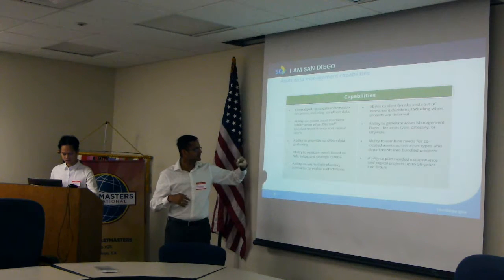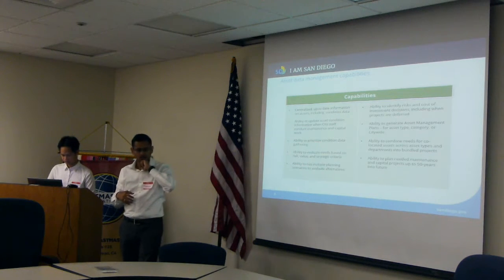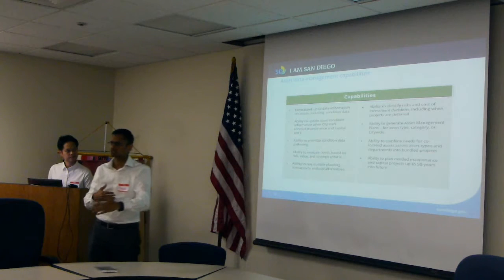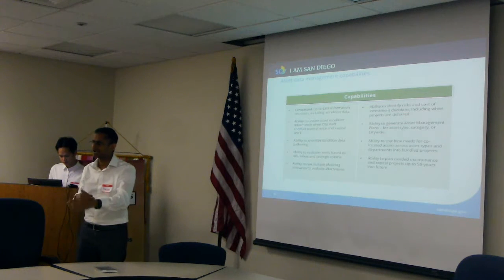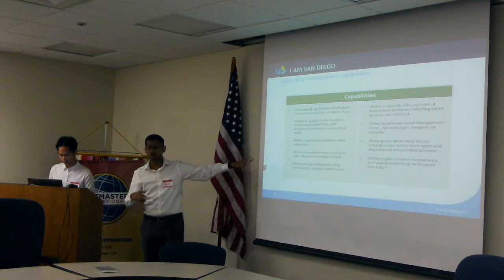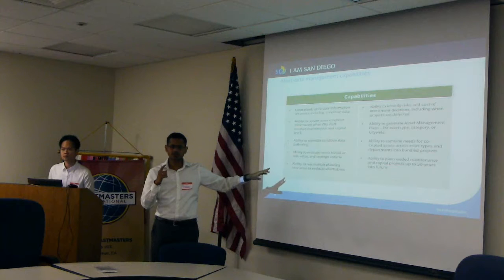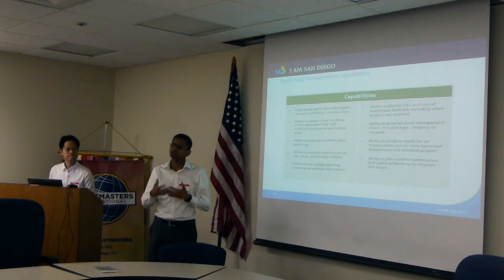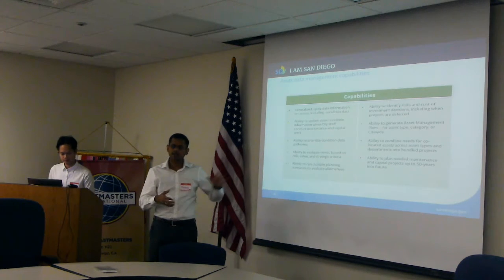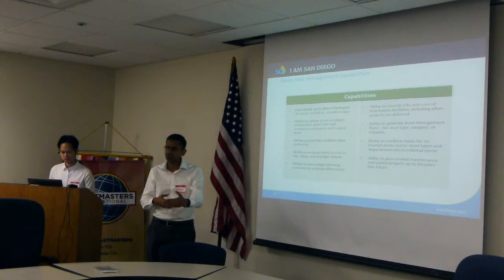One of the things that we would be doing is the ability to evaluate needs based on risk, value, and strategic criteria. That is, if the asset is close to its life cycle, where it's going to be ending in a few years, the risk of not replacing that asset is going to be higher. When we feed this information back into Riva, along with the calculations that we've put into that system, it provides detail saying that such and such an asset is nearing its lifespan, go ahead and work on a project.